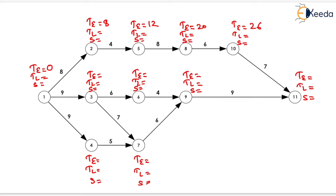For event 3, TE = 0 + 9 = 9. For event 6, TE = 9 + 6 = 15. For event 4, TE = 0 + 9 = 9. For event 7, TE = max(9 + 5, 9 + 7) = max(14, 16) = 16. For event 9, TE = max(15 + 4, 16 + 6) = max(19, 22) = 22.